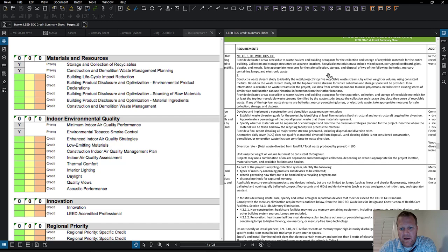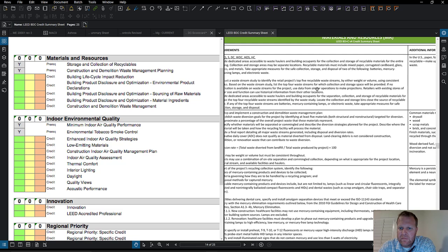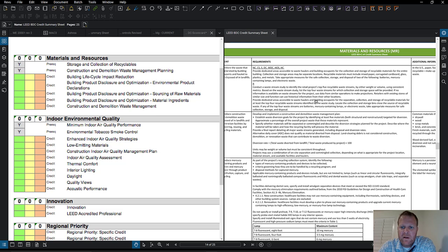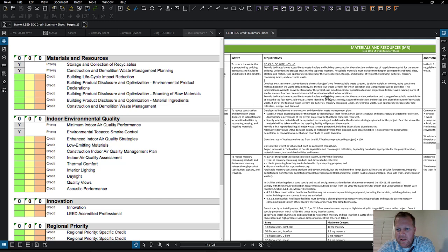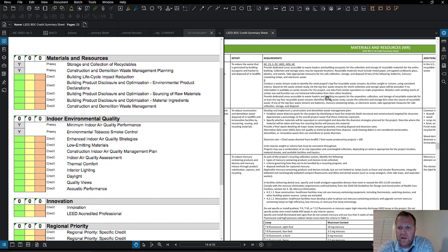On a non-LEED building, you don't have to go to the point of tracking it all. But on a LEED project, you have to actually track how much waste is being recycled — you can do it by volume or weight. You'd collect data from the dumpster company on weights for both the recycled containers and the material that went to the landfill.